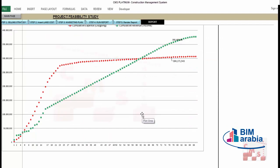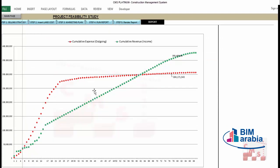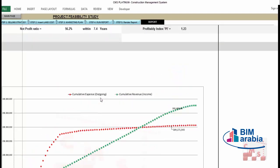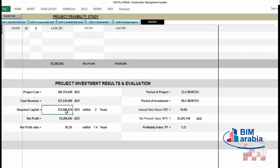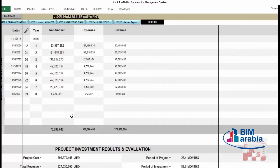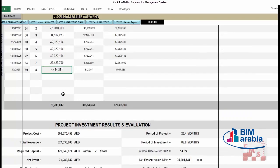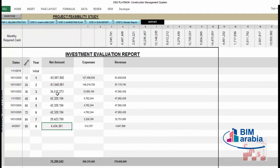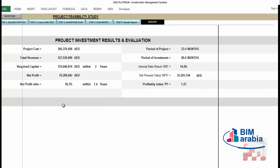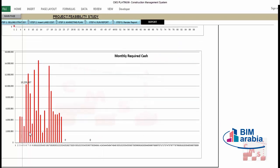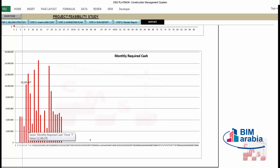Changing the selling method also helps. Increasing the advance payment to 15% instead of 10% changes the IRR to 11%, NPV to 31 million, and increases the profitability index while reducing the required capital. Increasing to 25% advance payment reduces required capital from 150 million to 125 million, further increasing IRR, NPV, and profitability index. Higher advance payments from customers directly reduce your required capital.